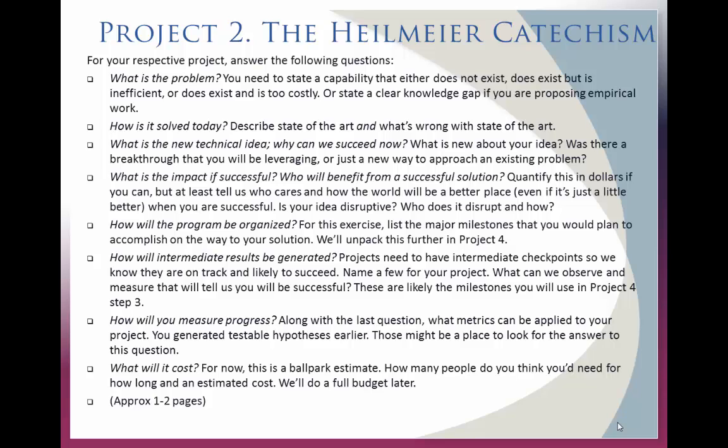So if you're talking about a 2, 3, 4 year program, your sponsor is going to want to be able to check in on you and say, are we on schedule? Are we behind schedule? Is it looking like this is going to pan out or it's not going to pan out? Where are some decision points that they can put to you to be able to evaluate your program? And how are you going to measure progress along the way? That's important. So what are the metrics that you're going to use, not just where the milestones are?